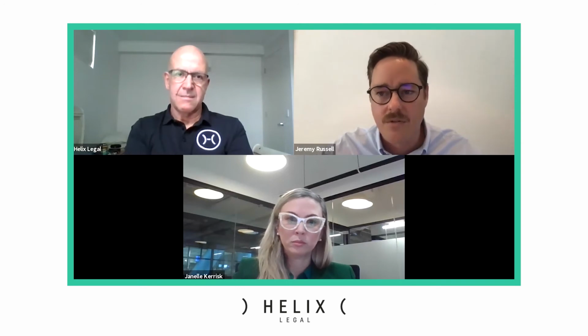You guys would be seeing that as well, wouldn't you? Yeah, definitely. And so do you see a lot of variations? If it's a very employer-focused contract, do you see a lot of variations being pushed through? Yeah, it really depends. If you price the contract correctly, less of a concern in terms of the variations. The concern is where you're tendering a project, and you've got tier 1 contractors coming back with one price, and then a tier 3 or 4 contractor coming back with a much lower price, where they haven't really built in any scope, and they're going to try to make up their profit margins through the variations that they might charge.